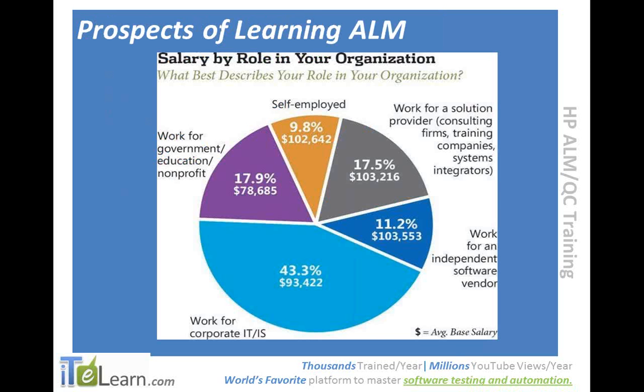So who will decide releases, a tester or a lead? Definitely the project manager or release manager, not the test lead for sure. I believe most popular releases would be 2 to 3 weeks. In my case, we are following 4 weeks of release, depending on the business need. So we are doing a monthly release.